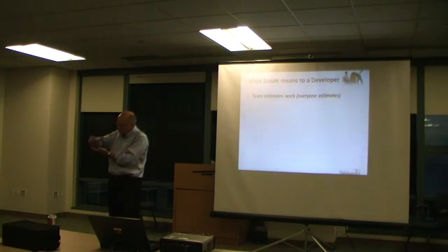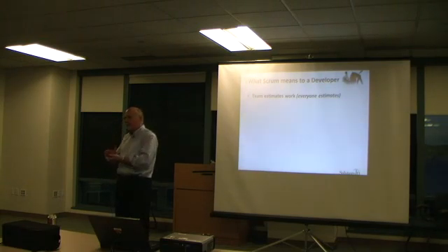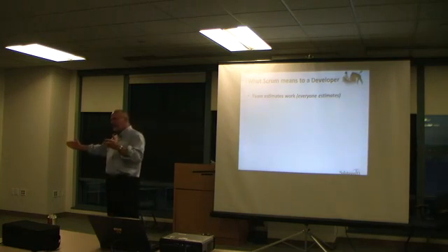So within a sprint, you say, let's test this out. Let's convert points to man hours. Let's do man hour estimates within this thing. And now let's see if that still fits within whether or not we think we can get done.